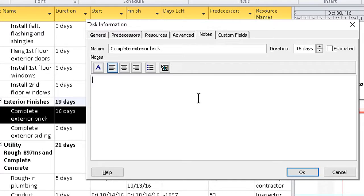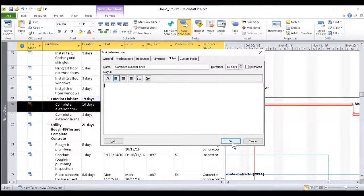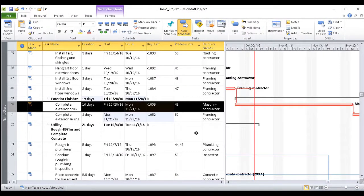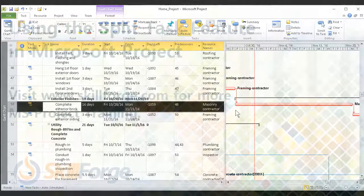In the Task Information dialog box, click the Notes tab, click the space for the notes, and type whatever is needed, then click OK. Splitting a task is fairly easy; making sure you note the cause so stakeholders don't get upset is pretty much a legal necessity these days. Split, then note — a good habit.